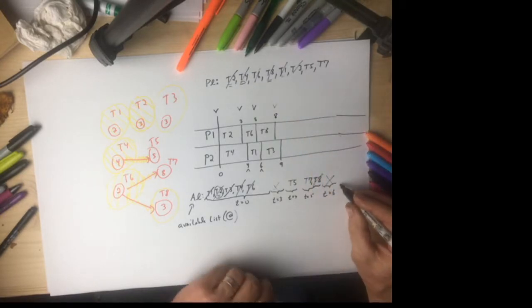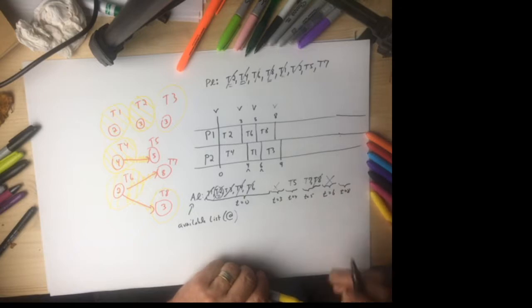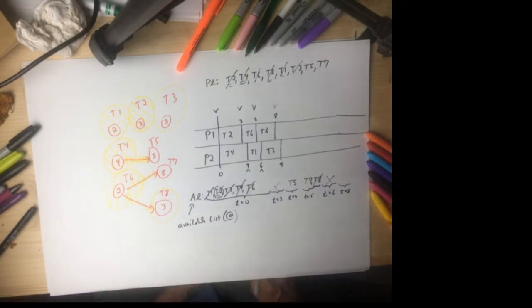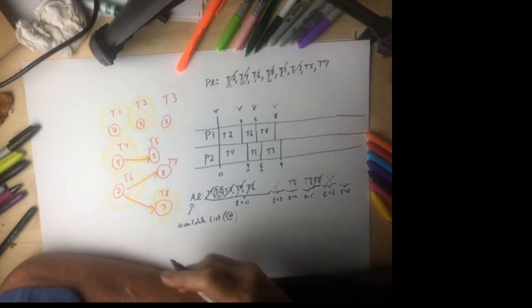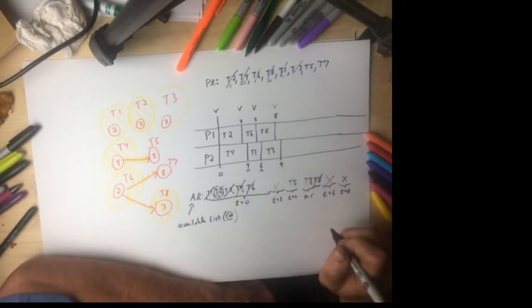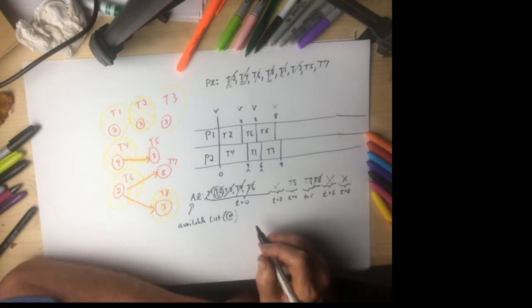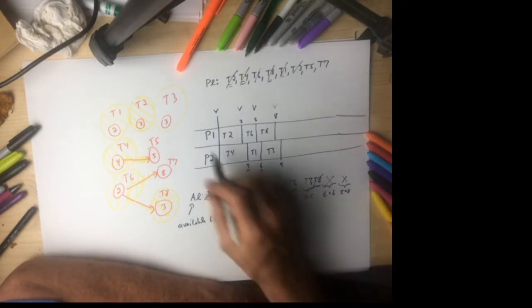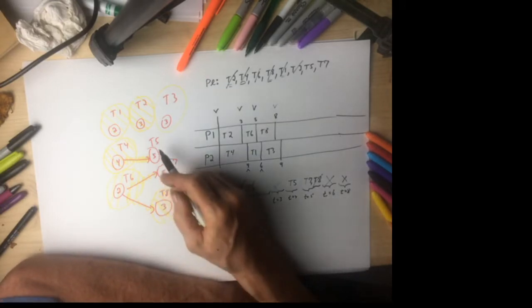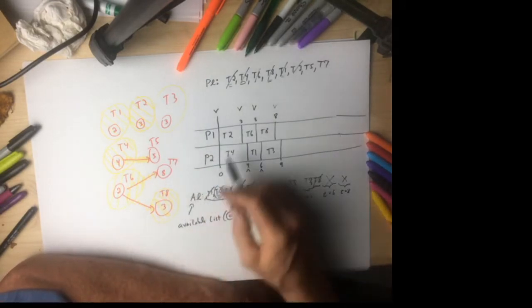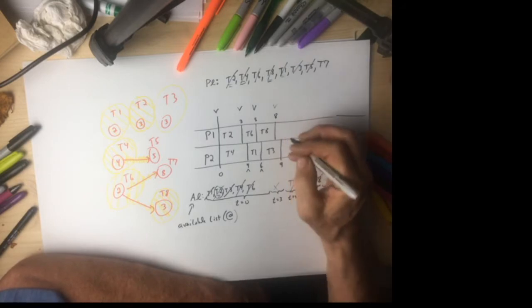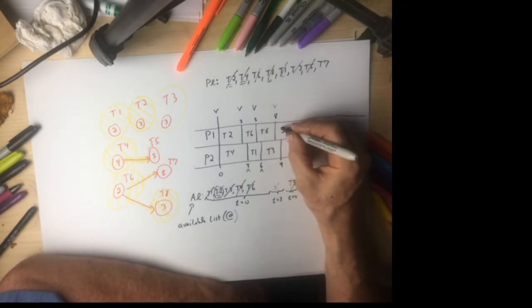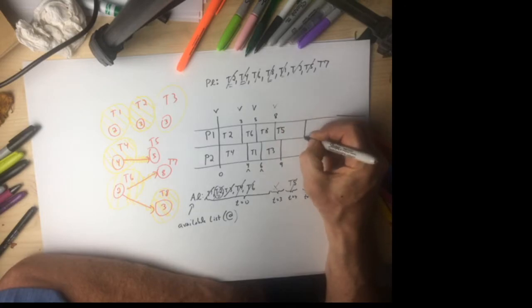So at 8 o'clock, who wakes him up? Person 1. He said, boss, I just finished T8. He goes, good. Crosses it out. And he looks, any new available jobs? Nope. Which jobs does he have available now? Well, only 5 and 7, because T3 has been assigned. 5 and 7 are available. How does he make a decision? He goes to the priority list. 5 is more important than 7. So he puts in T5 for 5 hours. 8 plus 5 goes out to 13.